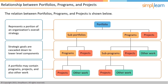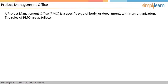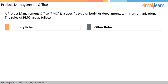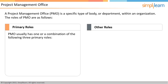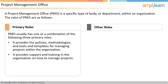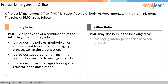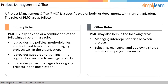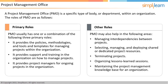The Project Management Office, or PMO, is a specific type of body or department within an organization. The PMO may take up any one or a combination of three primary roles: it provides the policies, methodologies, and tools and templates for managing projects; it provides support and training on how to manage projects; and it provides project managers for different ongoing projects. PMO may also help in managing interdependencies between projects, selecting and deploying shared or dedicated project resources, terminating a project if need be, and organizing lessons learned sessions while maintaining the project management knowledge base.